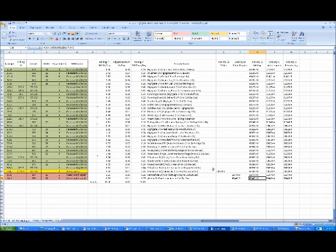So, Mike, the question is, how often are you guys updating the schedule? This is a great question. This kind of management on the resurfacing contracts has necessitated that the schedule is updated weekly. These two projects, SC-233 and 234, have really high visibility citywide right now in the media, with citizens that are tired of potholes from the winter, and with the city council that wants it done sooner rather than later. That was also partly the motivation, in addition to the geospatial distribution not being optimal. We also looked at it from the eye of, what can we do to improve the productivity and production? And so that led us down that path too.